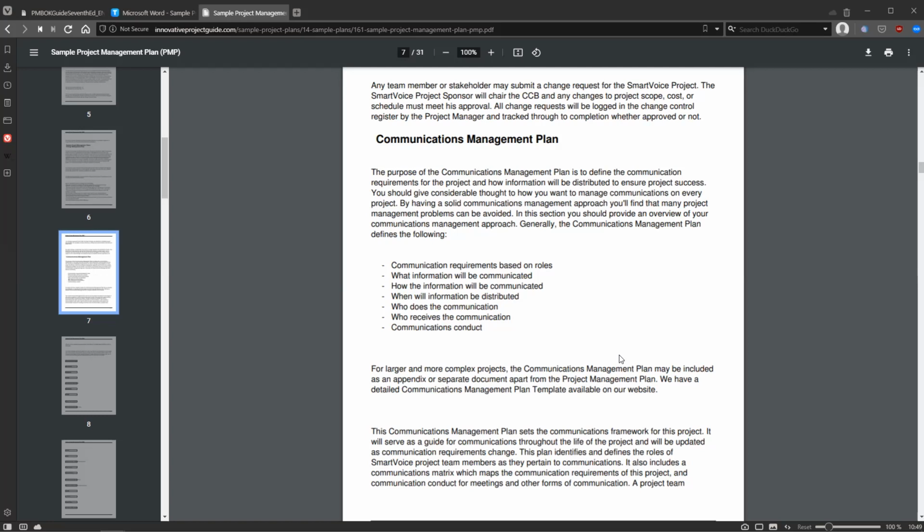Basically, within Microsoft Project, it was possible to define separate blocks of separate jobs, let's say. And within each job, you could define what you do and what it depends on, because you need to, let's say, meet certain criteria or do certain tasks before issuing communication or basically publishing this deliverable or sharing the deliverable with certain stakeholders. I used Microsoft Project to keep track of these tasks.